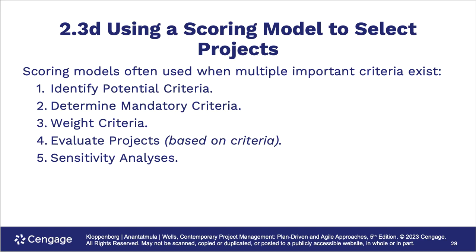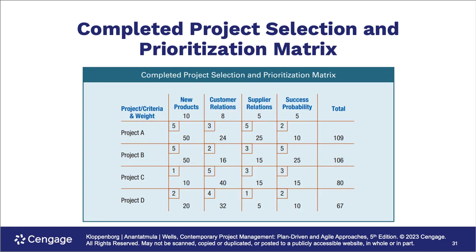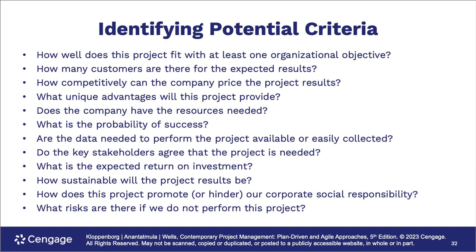So I have to weight what's more important to me, the size of the monitor or the way I can adjust it, the resolution or the cost. And it's not that they all don't matter, it's they're going to matter with more force than others. So these are decisions that have to be made. This is a way to have a matrix where you'll score it. And again, these are based upon how you weight, not W-A-I-T, W-E-I-G-H-T, or estimate things, the value.